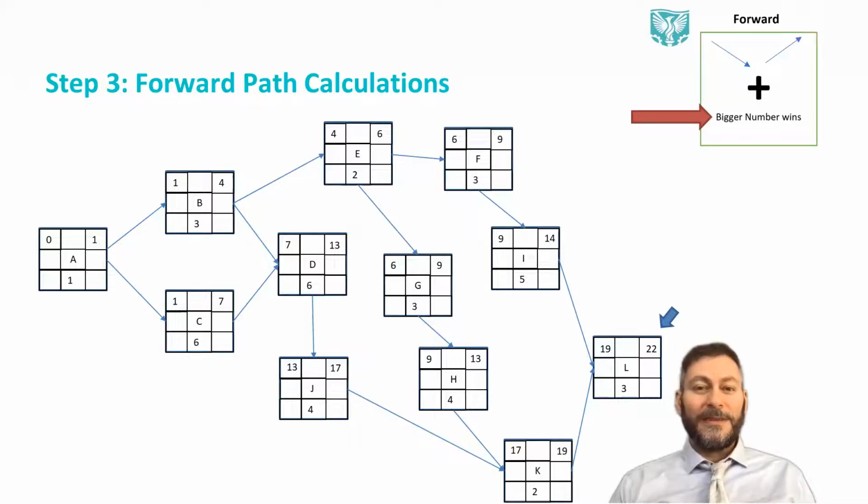Sometimes students make a mistake in the exam or assignment, where you ask, what is the total duration of the project? And they add up the table that we had at the beginning. If you did add up the table in the beginning, it's actually 50 days. That's because in this case, we have too many parallel activities. In fact, the project can be done in as little as 22 days. And that is the power of project network calculation. If we have all good resources and we can run several activities in parallel, we can finish it in less than half the time.